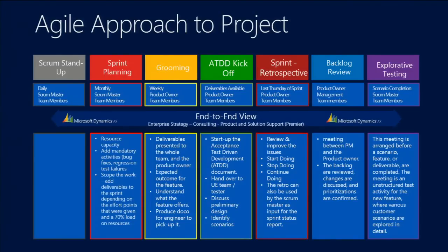I know that my CRPs typically, let's say, take 3 to 4 months to do. I actually have now a more scientific method of being able to extend out my project and have a much better chance of being able to achieve that date. Okay? Yeah. Question? Yeah, so back on the previous slide real quick.